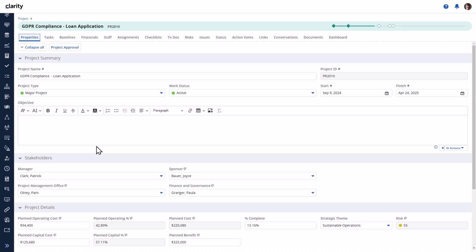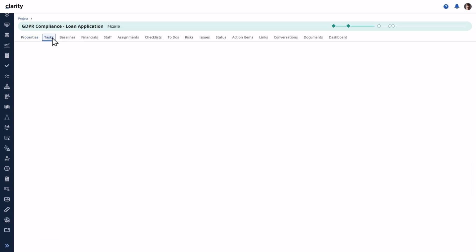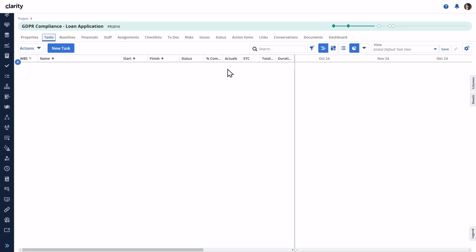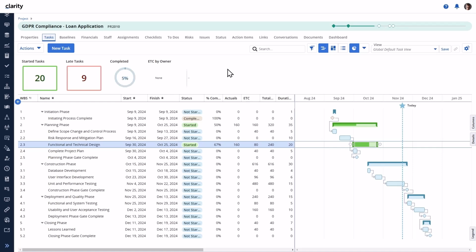As you can see, this project has some posted actual transactions, and the percent complete has been updated through the job. When the job runs to update the percent complete, it computes the total labor actuals divided by the total labor usage. Task percent complete is computed for this task for 160 hours divided by the total of 240 hours to get 67%.